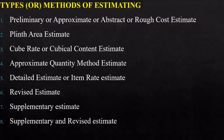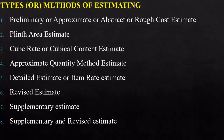The eighth type is the supplementary and revised estimate — a combination of both the revised estimate and the supplementary estimate. This is used when a work is partially abandoned or stopped and the estimated cost of the remaining work is less than 95% of the original work. In simple terms, if a work is abandoned or stopped at the earliest stages — when less than 5% or 10% of the work has been completed and the major part is yet to be done — you go for a supplementary and revised estimate.